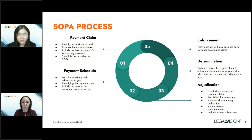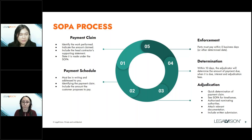The second thing that must be included in the payment claim is that it needs to indicate the amount claimed to be due. If there is a GST component, make sure it includes that as well. The third point is that it needs to relate to work performed on or prior to the reference date. The reference date is essentially the date you are required to issue the payment claim — stipulated either in the contract itself, or if there's nothing in the contract, by the requirements in the Act, which is usually the last day of the month in which the work was performed and each subsequent month.